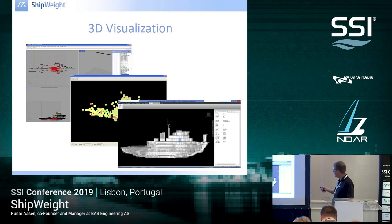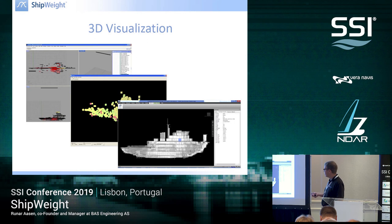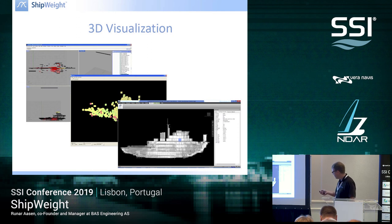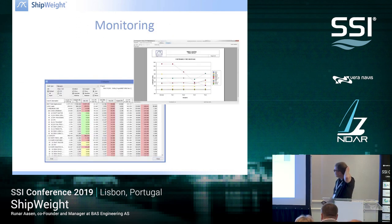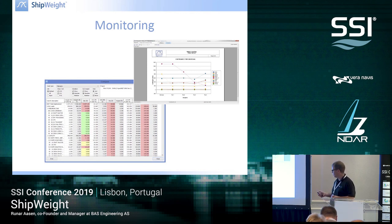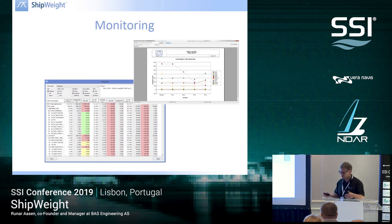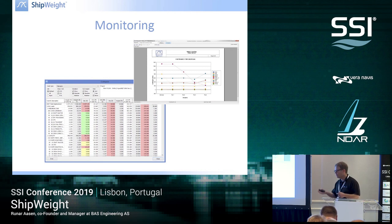You can click on an item and get the ShipWeight properties and do a search, and get your work breakdown structure. We have ways of color-coding it — for example, red on heavy items and blue on light items. For monitoring, we have tools that let you easily compare one revision of your project towards the next revision and do color-coding of where the weight is going up or down. We also have reports that show trend lines and show exactly where the weight is going up, going down, or staying the same.